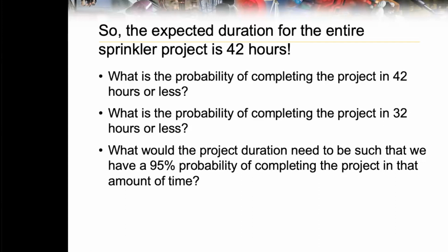They will plan the designer for the same week, probably, maybe, right? So they will not talk to each other. They will not talk to each other with every detail, and they will just plan their PERT like they are the only project in the whole company and the entire business. And maybe a few of the nodes will overlap in one week, requiring designers, and we cannot just cut the designer in half and help both projects, right? We have to level the resources. Okay.